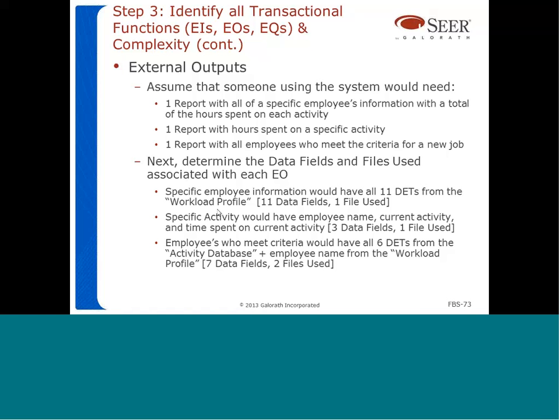The report of hours spent on a specific activity, our second report here, would list the employee name, the current activity, and the time spent on that current activity. So it's going to have 3 fields of information, and it's only going to reference 1 file.